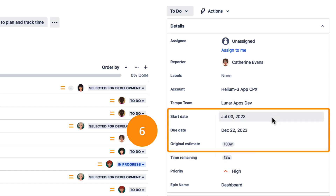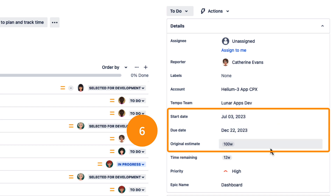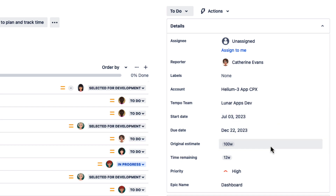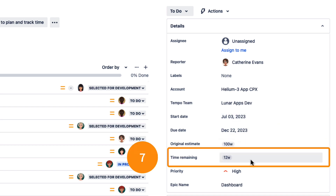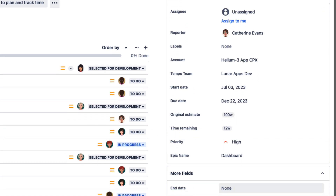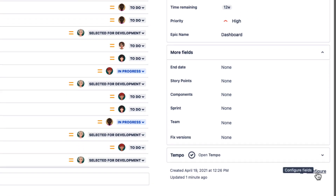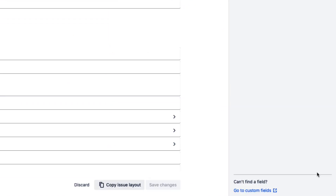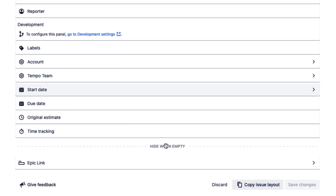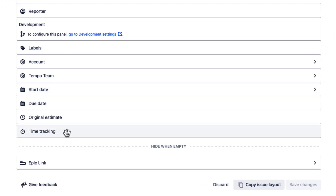Step 6: Enter the start date, the due date, and the original estimate. Step 7: Also make sure that the Time Remaining field is available. You can get this by adding the Time Tracking field to the issue screens, if it's not there already.